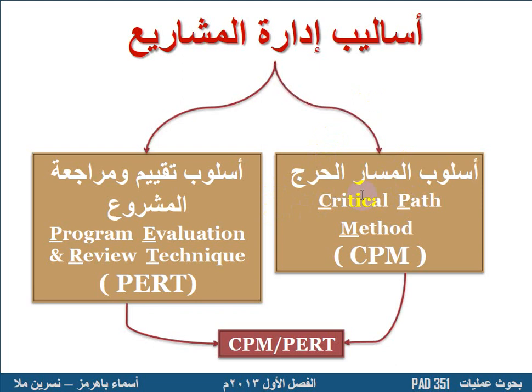The optimal duration can be computed by the critical path technique, while the most probable time duration or due date is calculated by the PERT method, program evaluation and review technique, or project evaluation and review technique.